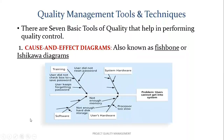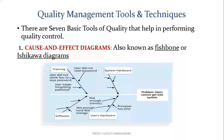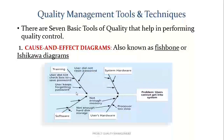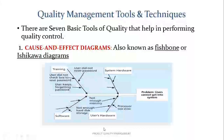There are seven basic tools of quality that help in performing quality control. The first tool helps you explore the causes that might be producing the problem. It is very important to know the real cause of the problem before thinking of any possible solution. The fishbone diagram gives you a comprehensive list of possible causes to identify the root cause of the problem. In this diagram, the root cause of the problem is that the user cannot get into the system, and the possible causes are training, system hardware, software, and user's hardware.